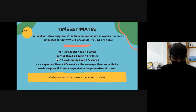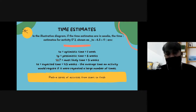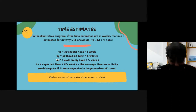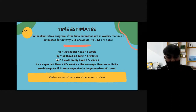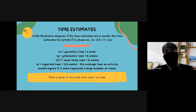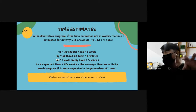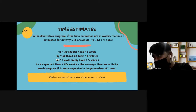How do we determine the critical path? The critical path is determined by adding the days or the time on each network path.